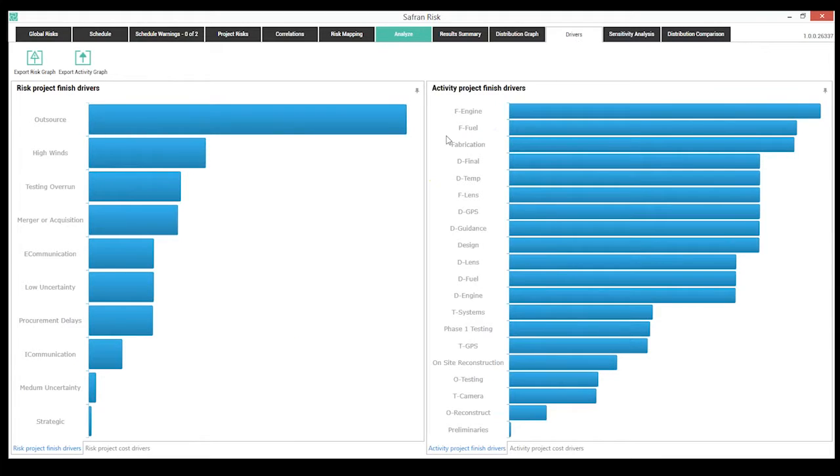I can walk back through again and review what's driving my schedule now. I can see that outsource has now had a much stronger impact on my project. Just by outsourcing those few additional activities, I can see that, wow, it really is driving my project finish.